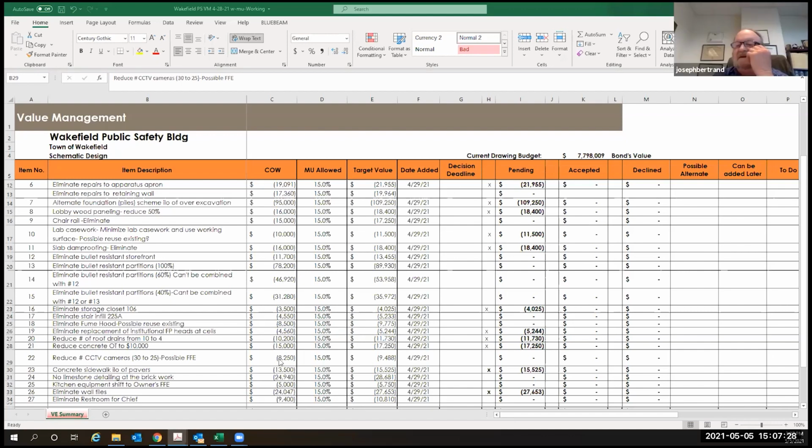But is it in the electrical? It's in the unit rate for this deduct. The value of the wiring is up in electrical, yes, because the unit rate we've got in the security line item, for example, is less than that. It's just the camera that we've got in the security line item itself. The value of the wiring is up in the electrical, but that's irrelevant to this breakdown here.